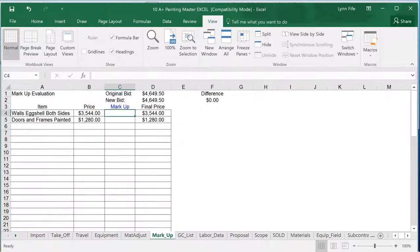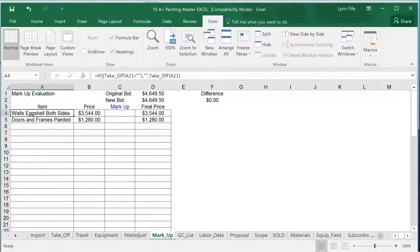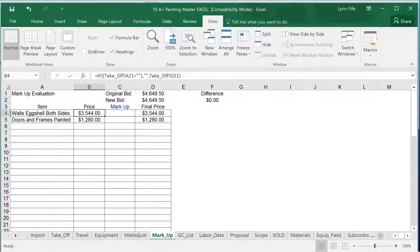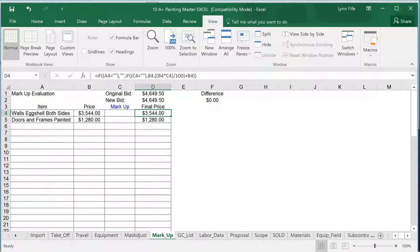The markup allows me to use subcontracts. If this is a wallpaper line item, I could mark that up an additional 15 or 20%, sub it out for this amount, and it will tell me how much to charge my customer with the markup included, again adjusting the final price of the customer.